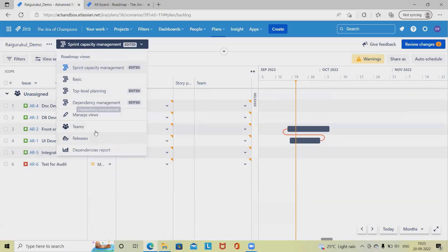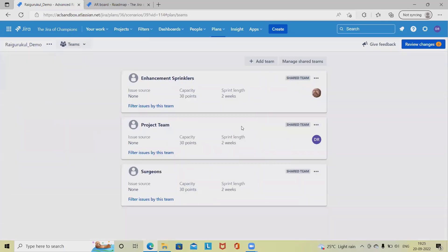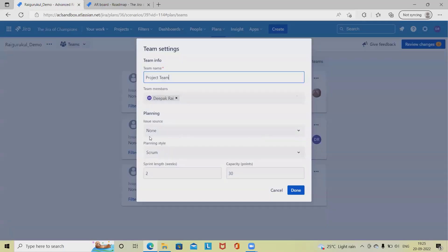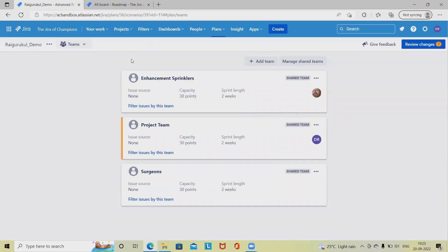From there we can add teams inside the plan. When adding the team, we can define the capacity — how many story points of capacity we have. We can also customize it accordingly. In team settings we can change the capacity points as needed.